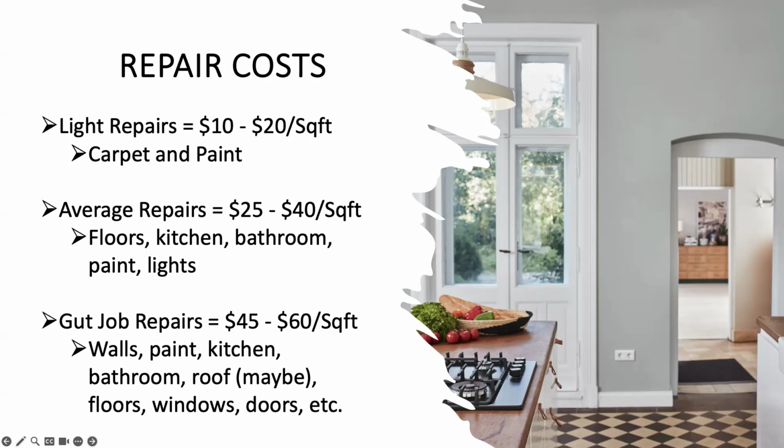So if you're looking at light repairs, these are going to be very minimal types of projects where the property is really well maintained by the homeowner or investor. Usually these are going to be very light stuff that you're looking at, and most of the time it's more on the rental side type of projects, where the work is going to be $10 to $20 per square foot.